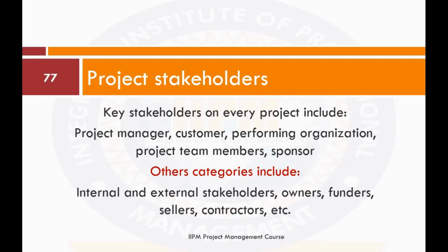By action-oriented approaches, we want to define how many messages do we want to send to them? What's the frequency of the message per time? What kind of information are we going to be sending to them? When will be the best time to send them that information? What will be the best time to have a meeting? What will happen to determine if there will be a meeting or not? If you put those things out in your strategy, it will become much more definite on how to manage them, okay?